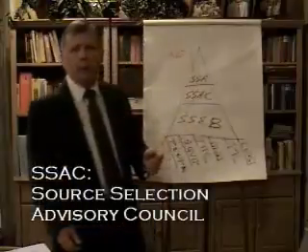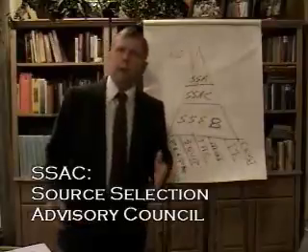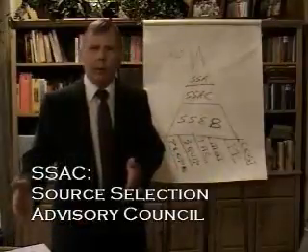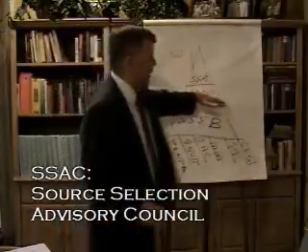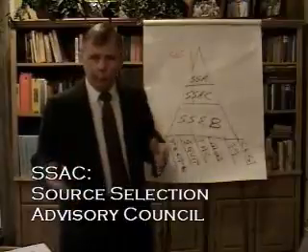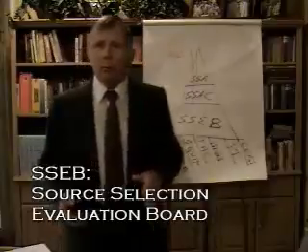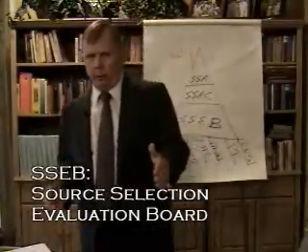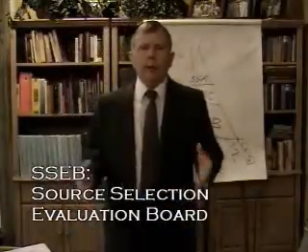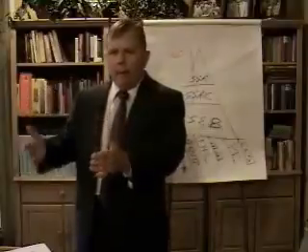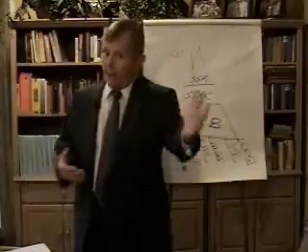The Source Selection Advisory Council: if the source selection authority determines that they want to have individuals help them in the determination of which contractor to award to, they can select an advisory council for that purpose. They would also have a source selection evaluation board made up of technical individuals that would evaluate each one of the contractor's proposals against the evaluation factors that we've identified in the solicitation.